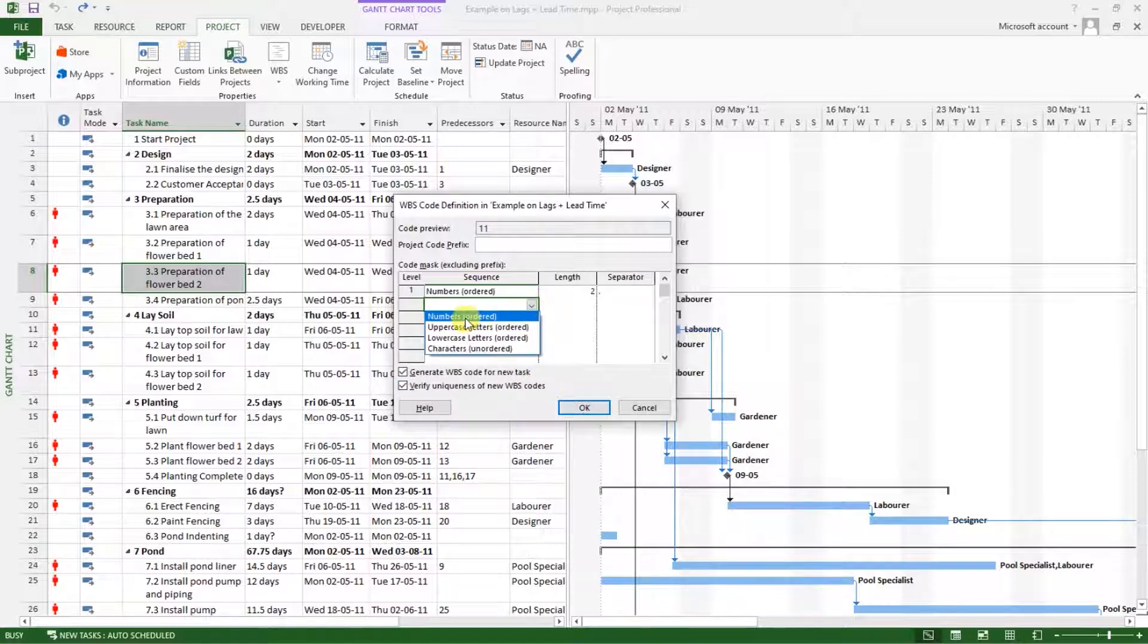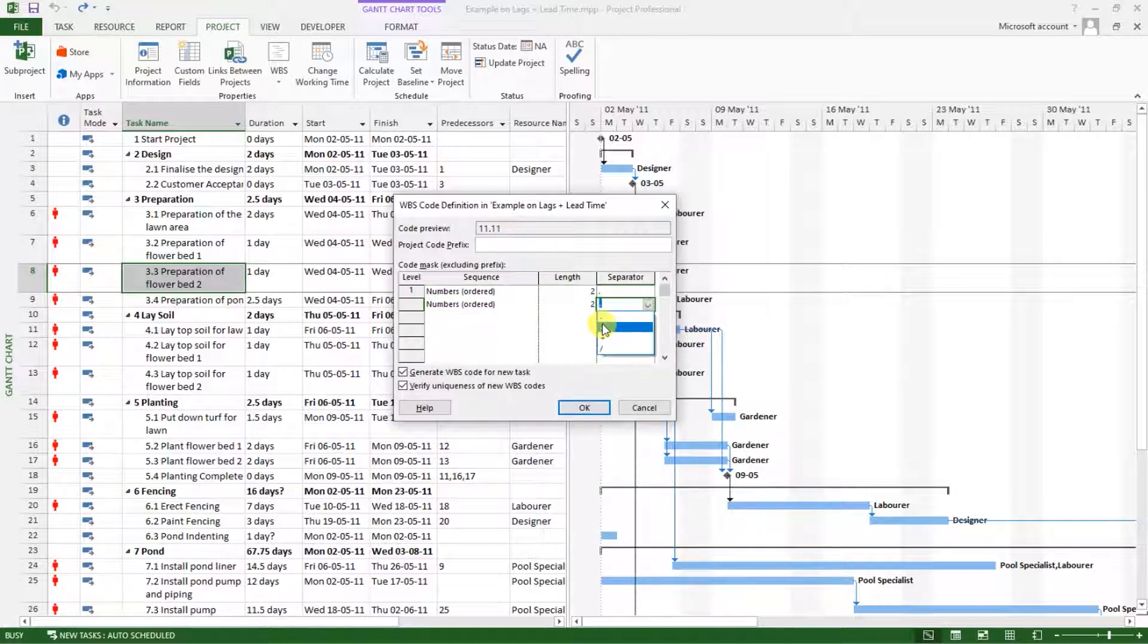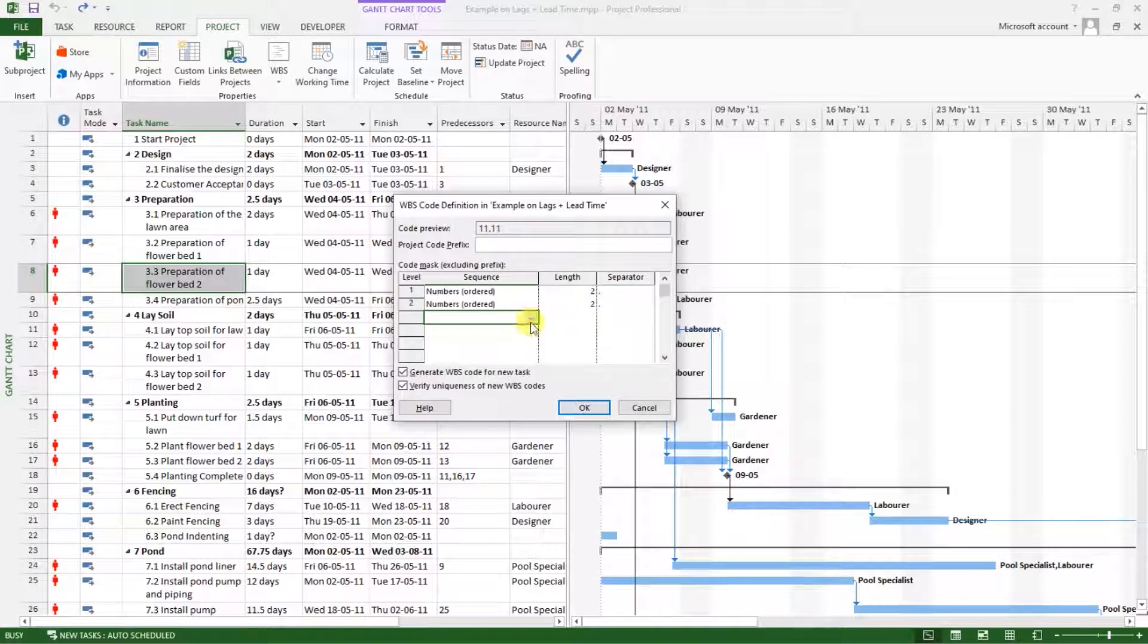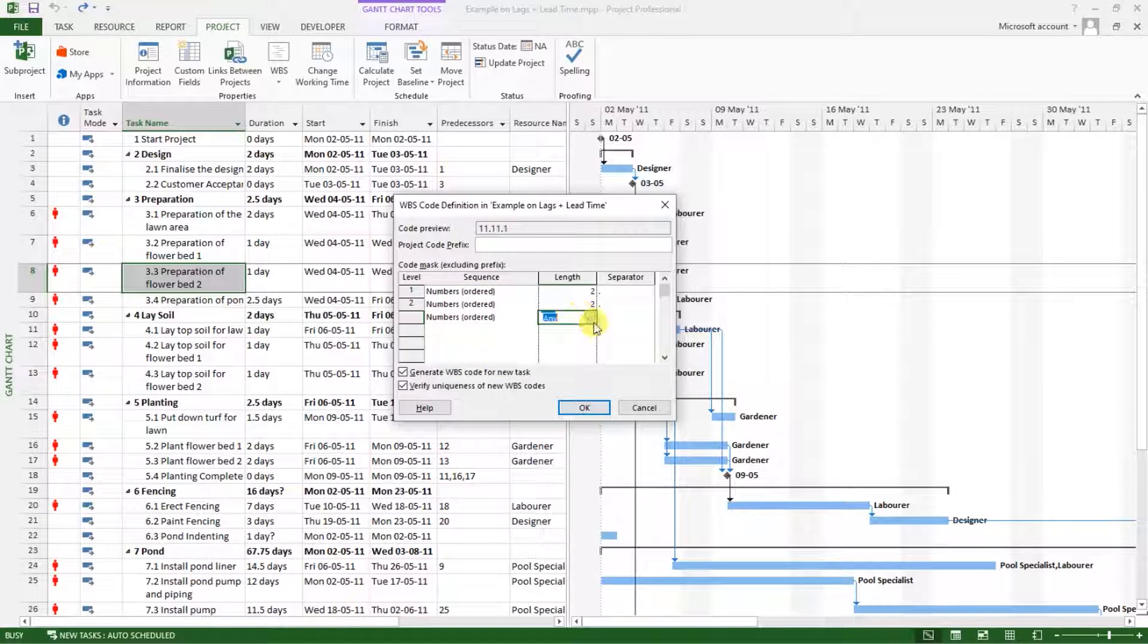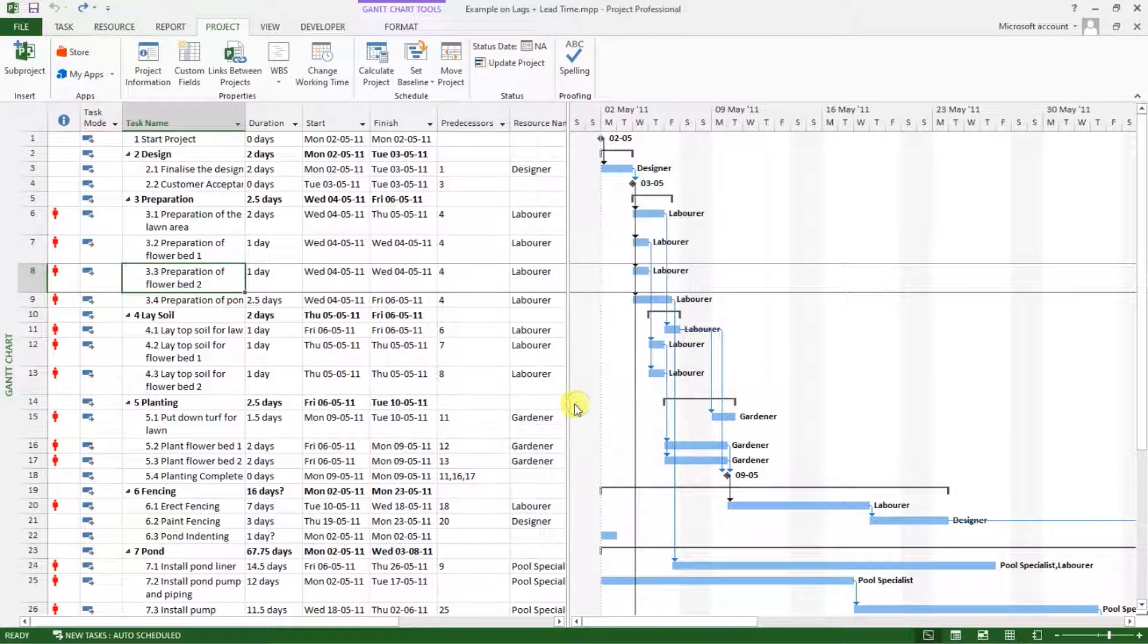So for the next level, I also will have numbers, and the length will be two digits with a dot as the separator. We will have up to three levels, and I will put the same options for every one of those. Then click OK.